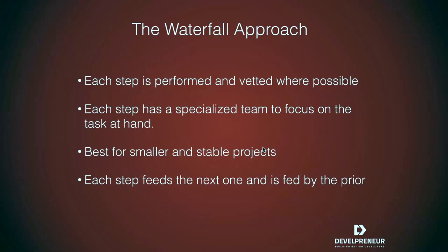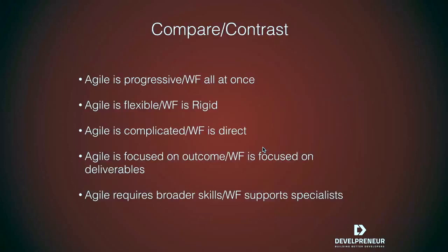If they change, well, then technically you would need to go back and restart the requirements phase and design and everything else. There's better ways to do that. You're not going to start from scratch, but technically that would be, I guess, how it would work. And again, just to reiterate, each step as you complete it is the source information for the next step. So you are fed by the prior step, and then you feed the next step as in the waterfall approach.